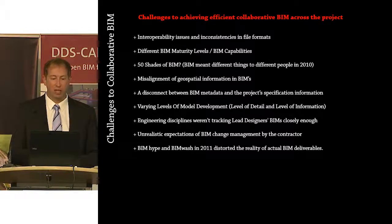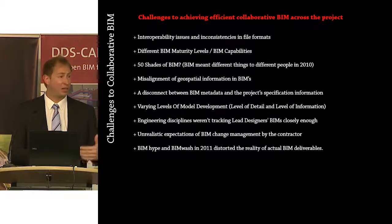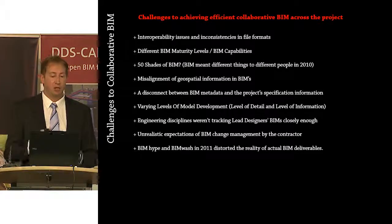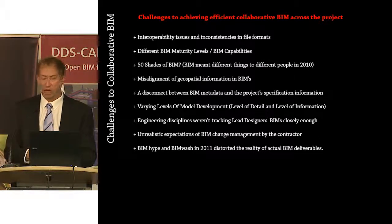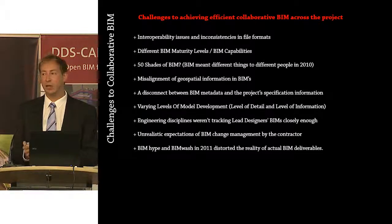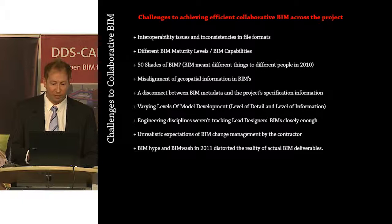Another problem we had was engineering disciplines weren't tracking the architectural lead designer with a high enough frequency. That's a very valuable lesson we learned. Today we try and have design workshops in the office, which are DTMs, basically design team meetings, which are followed by BIM workshops closely thereafter to make sure that everyone understands the latest changes. We do model reviews with a much higher level of frequency as well, and that way we can ensure that the structural engineer and the mechanical, electrical, plant engineers follow the lead designer's changes much more frequently.